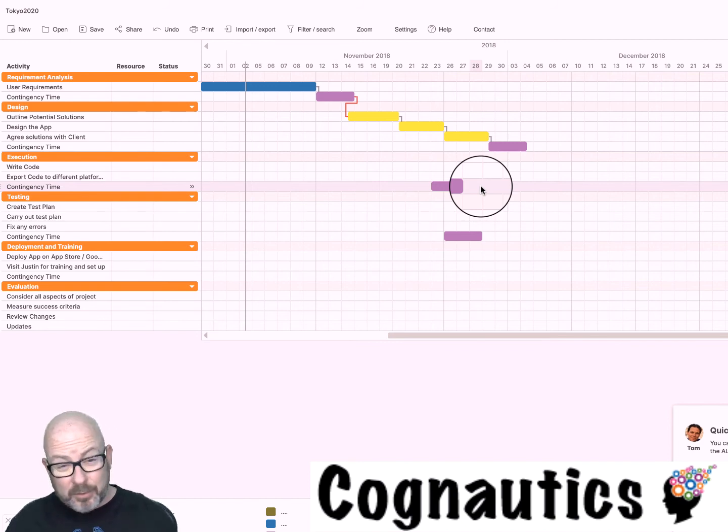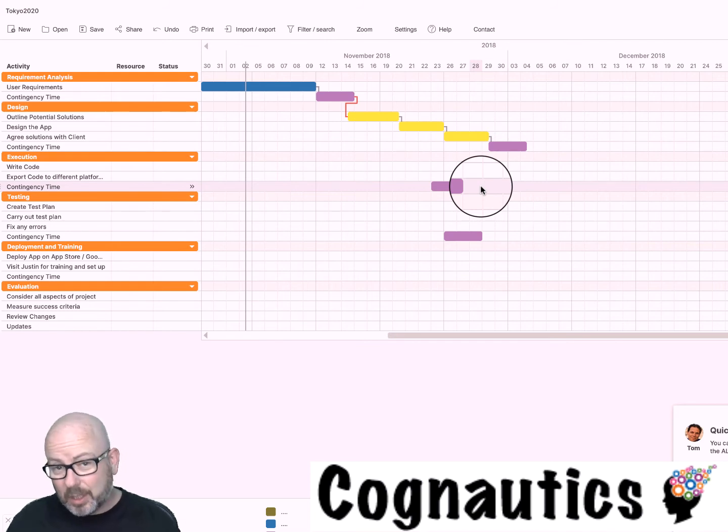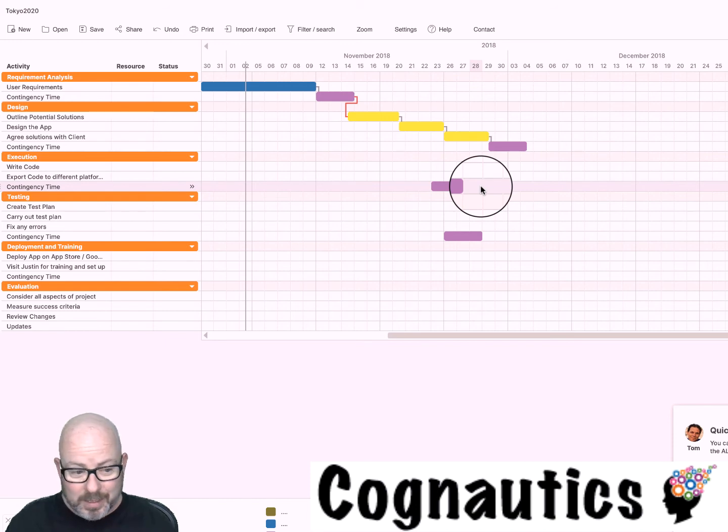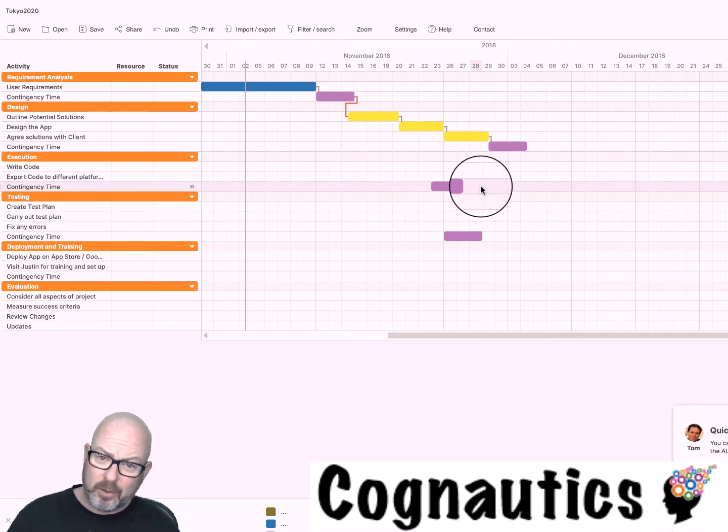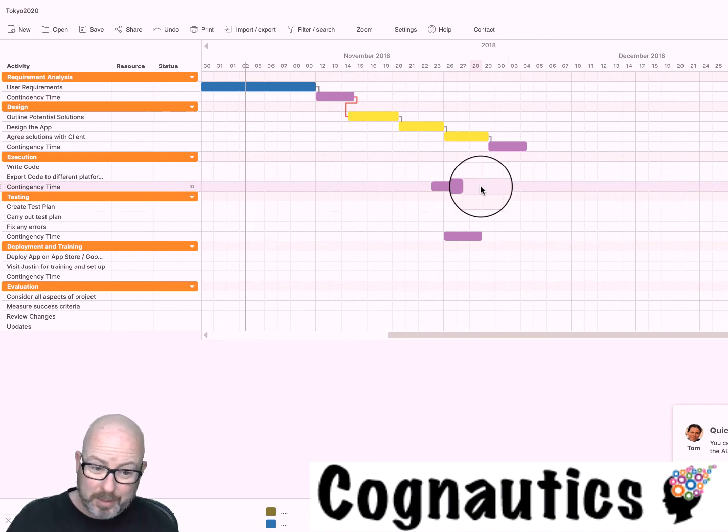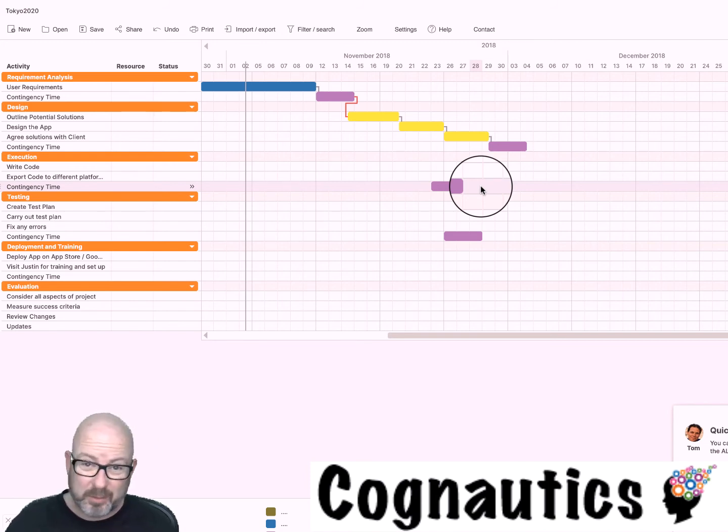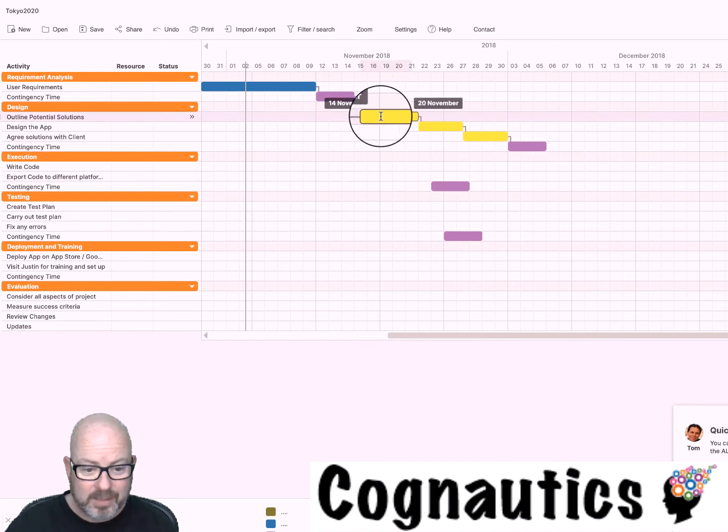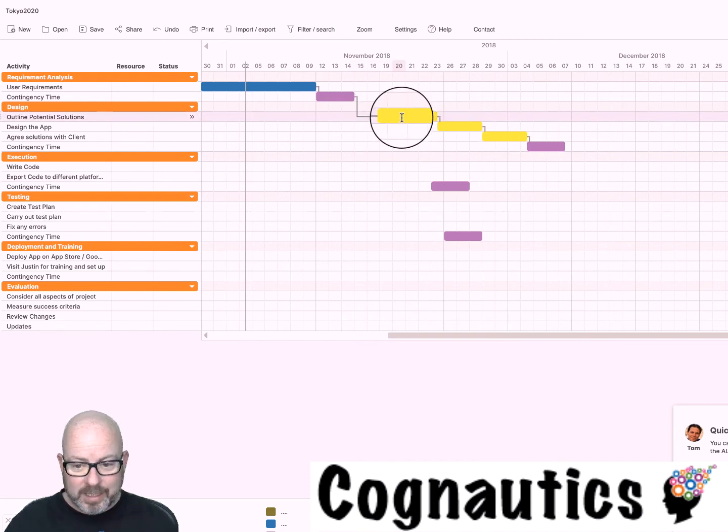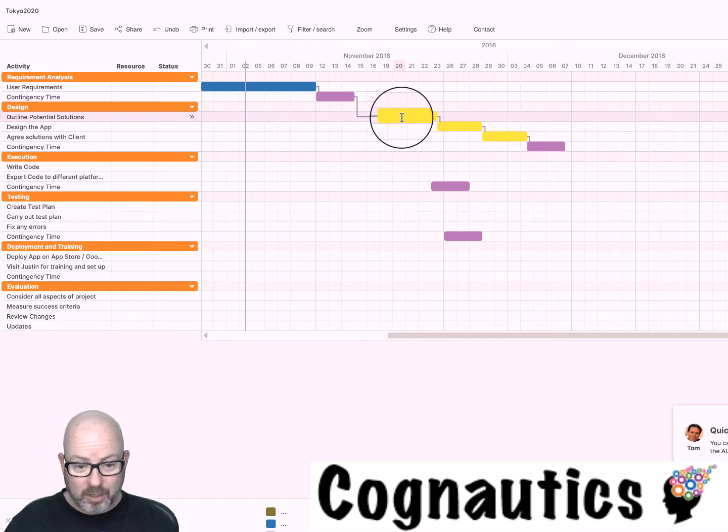In the case of your project, everything is contingent on the previous thing having been done because I'm guessing most of you are using the waterfall method. If you're using the iterative method or any kind of iterative method you will need to have a slightly different approach, but there are still going to be dependencies that you can show. You aren't going to be failed on this task if you don't show dependencies, but it's just good practice in project planning. That is a really simple explanation of how you will put your Gantt chart together.